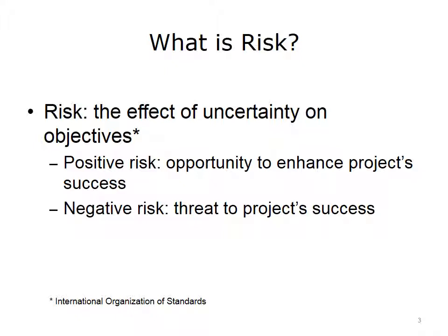Positive risk events are called opportunities. As the project manager, your goal is to create an environment where positive risk is cultivated, while enhancing the constructive outcomes of these opportunities. Negative risk events are referred to as threats, and they can hinder the project objectives. So you will want to create an environment that impedes negative risk while reducing its impact when it does occur. It almost always costs less in both money and time to prevent negative risk from occurring than to take corrective action later.